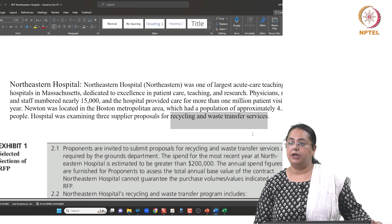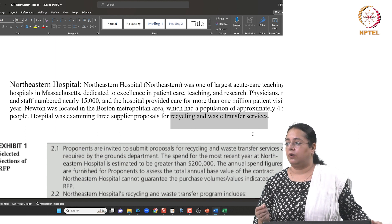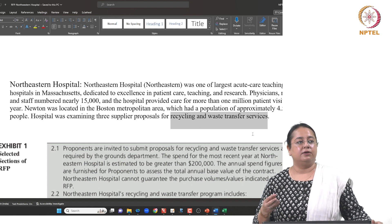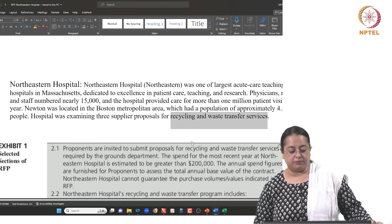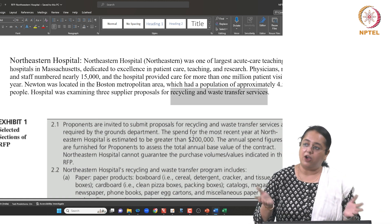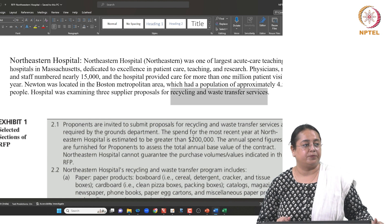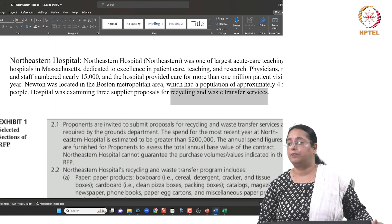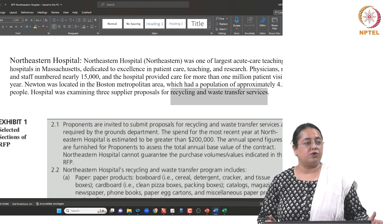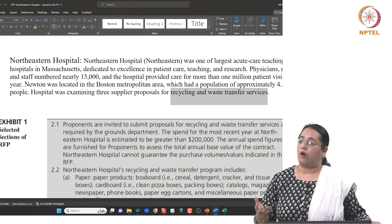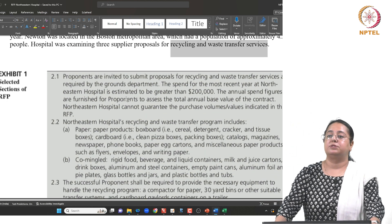This is a request for proposal. Had this been a requirement for medical equipment with clear specifications, they would have used a request for quotations. However, because this involves services — specifically waste transfer services — along with required equipment, they want to see what potential bidders have to offer differently. Let's look at how this request for proposals is written.